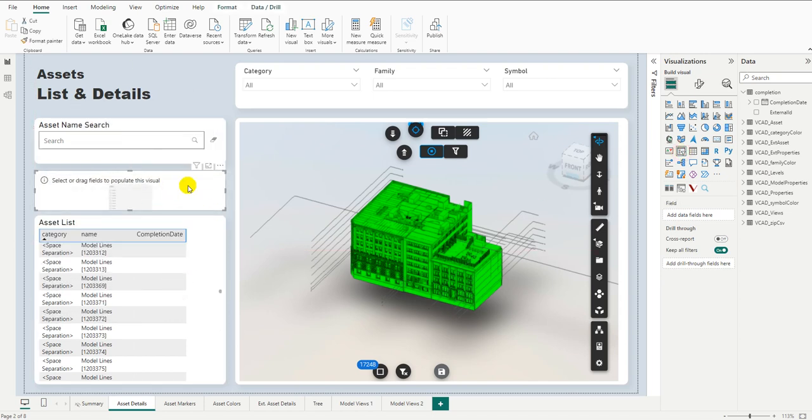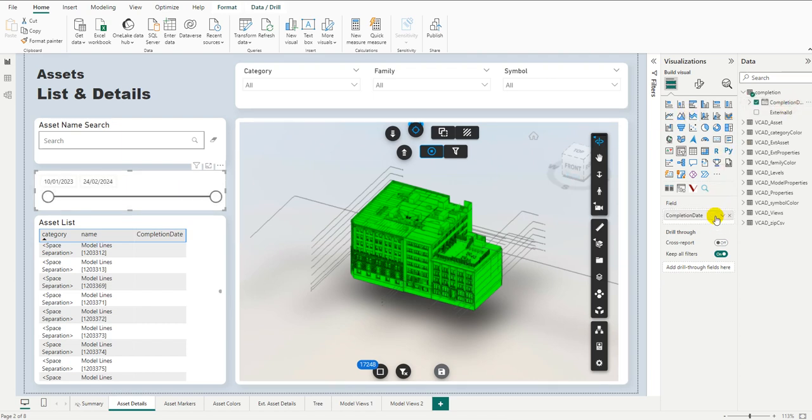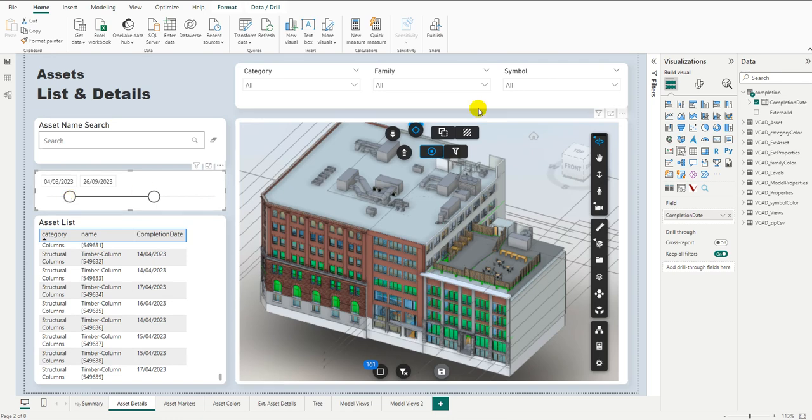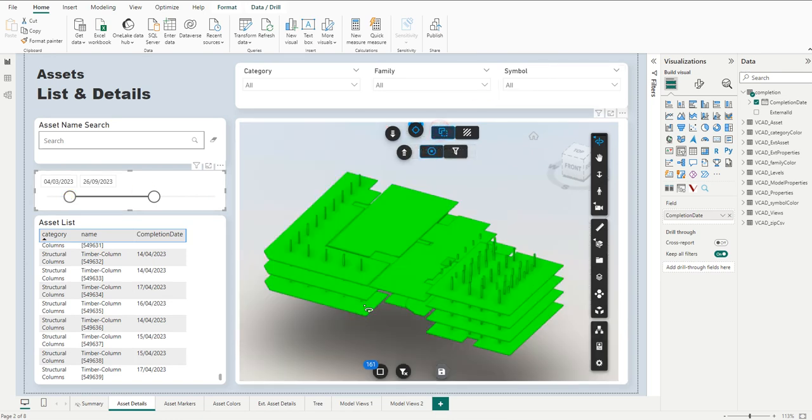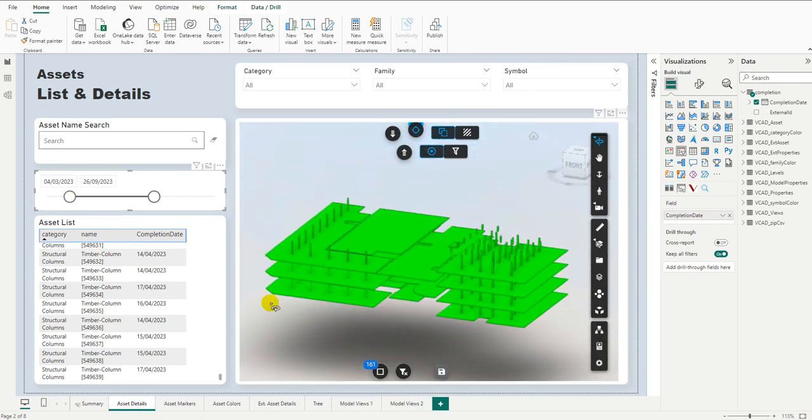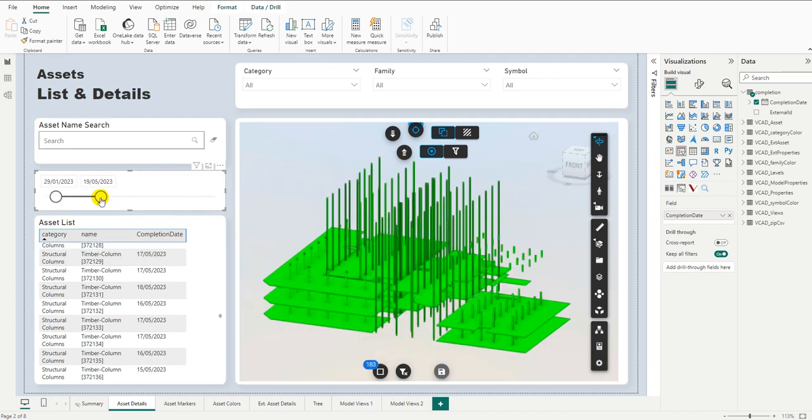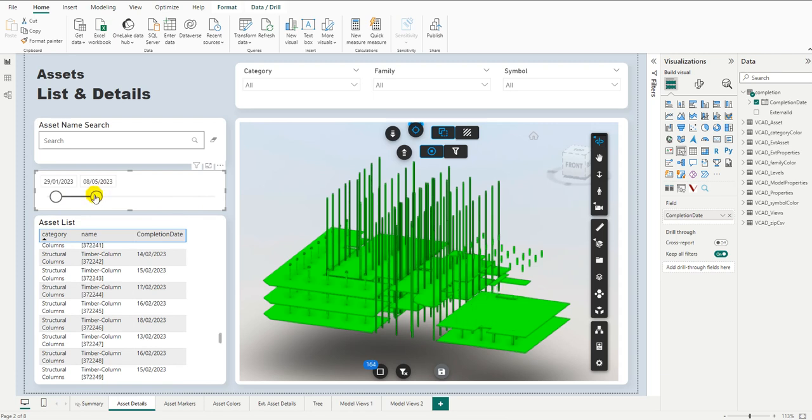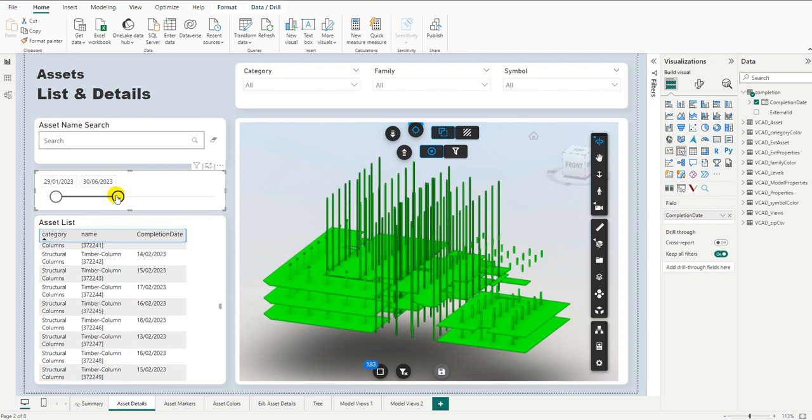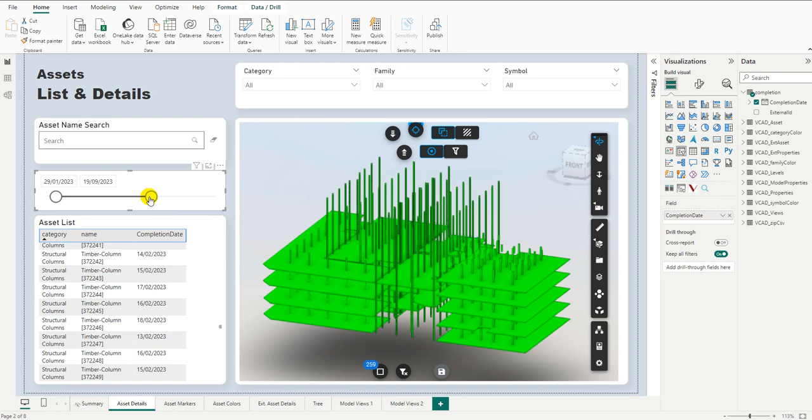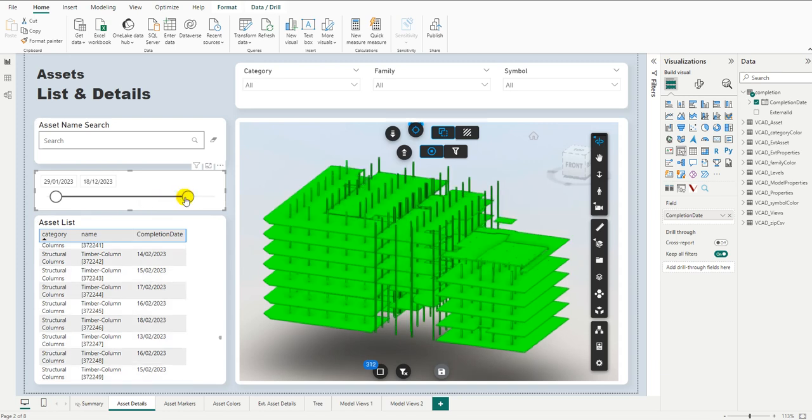And here we're going to go ahead and add in a slicer. In my slicer, I'm going to bind my completion date and Power BI realized it's a date, so it's giving me a between slicer. So if we filter it out and let's hide what we're not looking at, we can see over here we're basically reviewing the items that were constructed in a certain timeframe. If we stretch out the timeframe, we can see items get added to the model, basically showing us what has been added over time. So this is sort of the final result we want. We want something that automatically goes through the various dates and shows us what has been constructed up to a certain date.